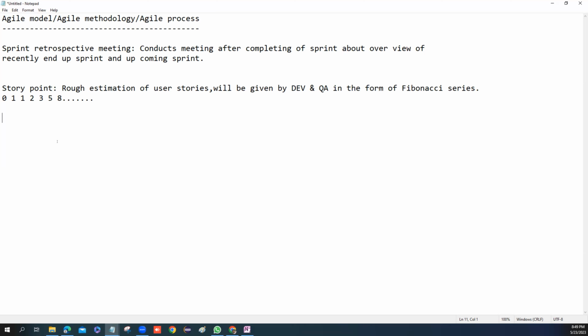So in that Scrum meeting or stand-up call, which happens every day for 10 to 15 minutes, we discuss what we did yesterday, what we're going to do today, and what we will do tomorrow, as well as any issues, blockers, or problems we are facing during our sprint.